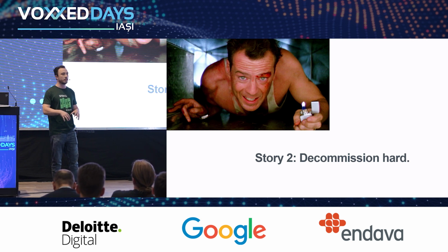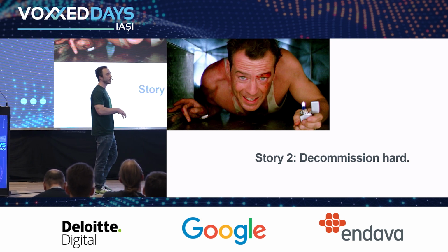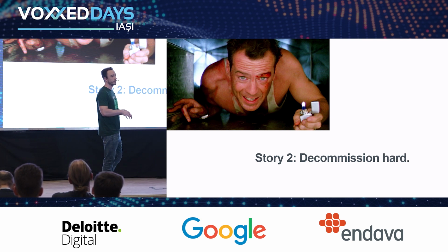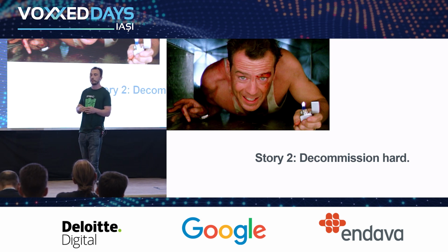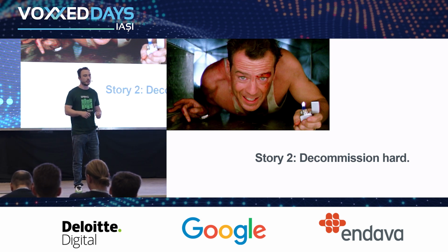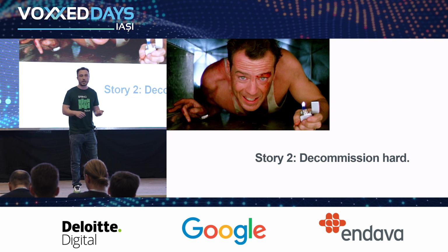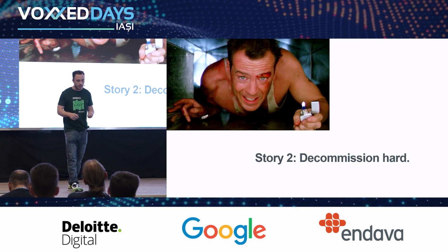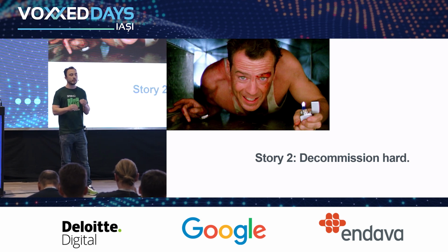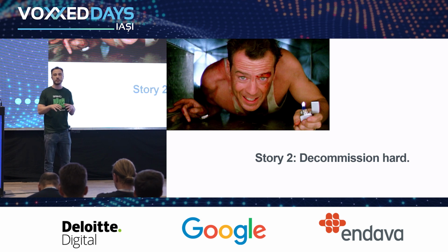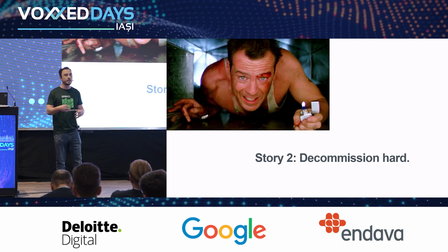I left behind things that I knew shouldn't be that way, the way we implemented them. But I always kept track of them, like I always keep track of all my debts. When I owe something to someone, I always know that I have to pay back. And I keep that in my backlog, but responsibly, in such a way in which I know exactly what I leave wrong with the system, but I spend the minimum amount of time to build what I need.